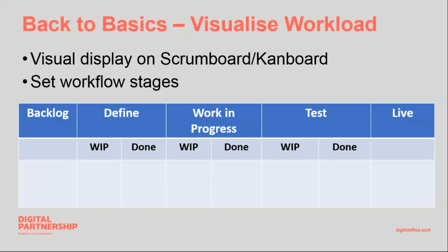And this actually fitted in and around the whole team's workload. So whether it was writing lines of code, or building an application, or creating a range of content for the website, this really worked for everybody in the team. The next phase was our test phase, and we used that for our acceptance testing, which we always carried out with the services, and where possible we did that with our customers in Fife as well.